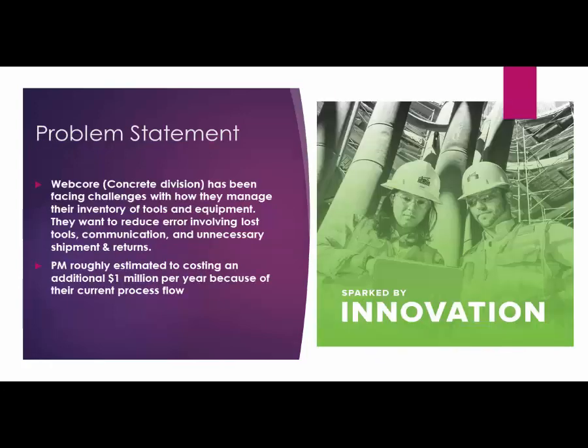Now we'll take a look at our problem statement. Webcor's concrete division has been facing challenges with how they manage their inventory of tools and equipment. They want to reduce error involving lost tools, communication, and unnecessary shipments and returns. After taking into account multiple large-scale projects, the project manager roughly estimated that these challenges to their current process flow is costing them upwards towards an additional $1 million per year. Now, realizing that problems are arising is a step towards innovation. Webcor is known for leading industry breakthroughs and bringing those advantages to the job site first.